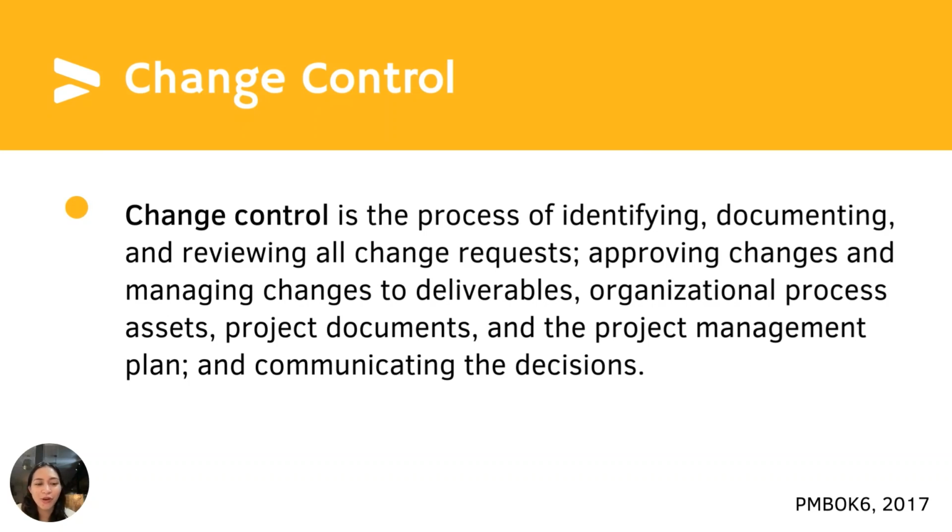It is the process of identifying, documenting, and reviewing all change requests, approving changes, and managing changes to deliverables, organizational process assets, project documents, and the project management plan, and communicating the decisions in line with this. The changes that we are talking about here may or may not impact the project baselines. Sometimes only the performance against the baseline is affected. The decisions here are made by the project manager. These will be quite heavy and crucial decisions to make.